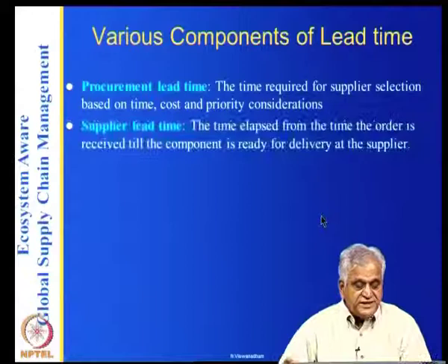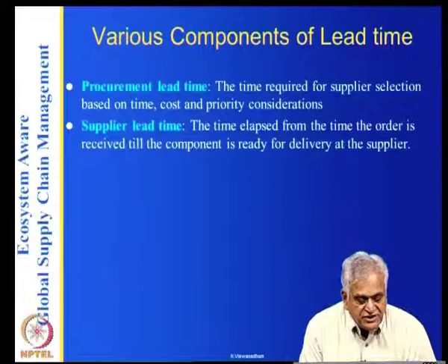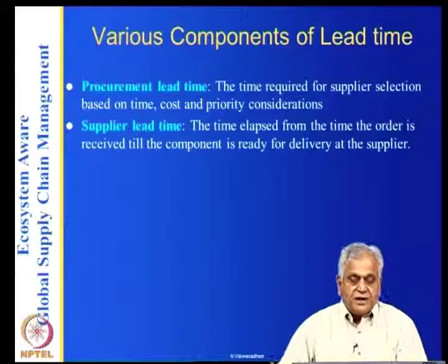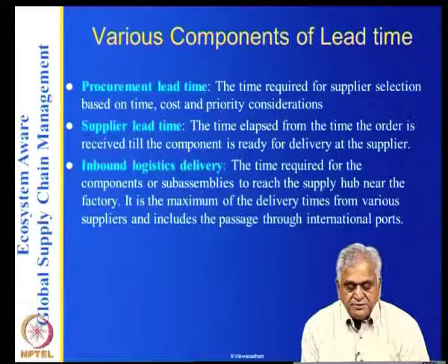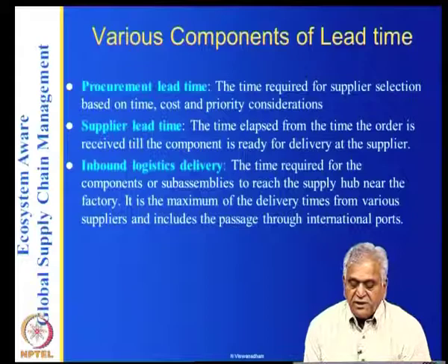The second time is the supplier lead time. The time elapsed from the time the order is received till the component is ready for delivery at the supplier. And then the inbound logistics, the time required for the components or subassemblies to reach the supply hub near the factory, is the maximum of the delivery times for various suppliers and includes the passage through international ports.